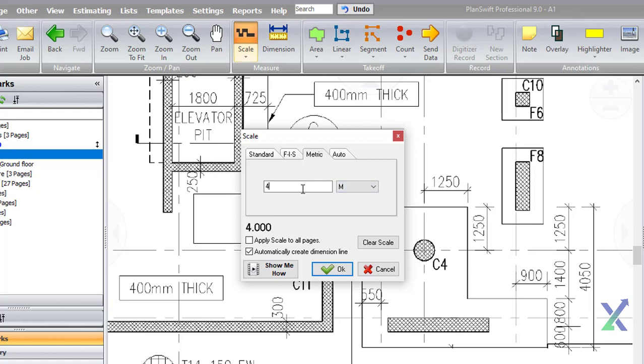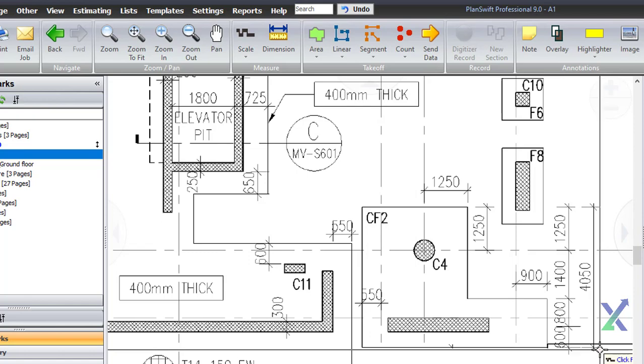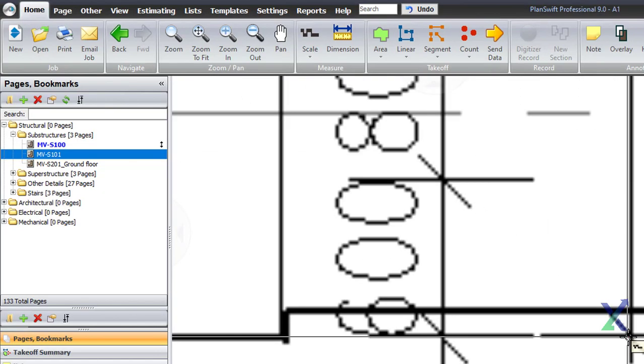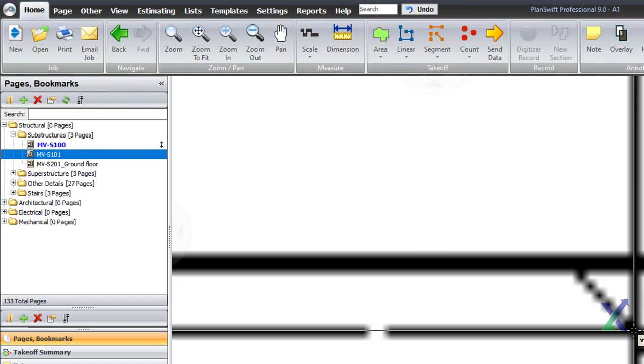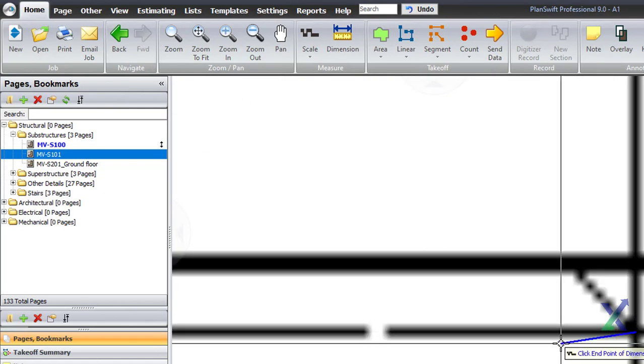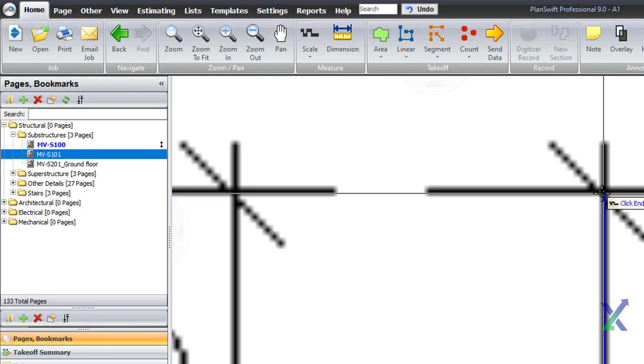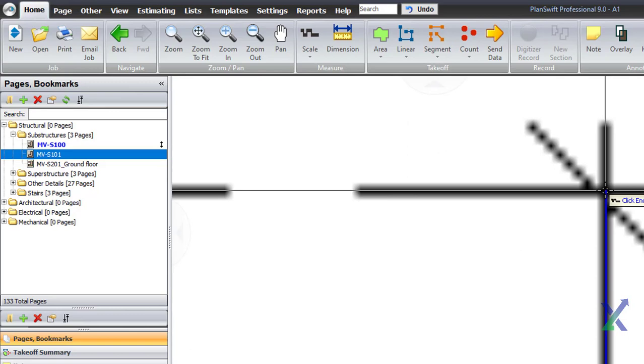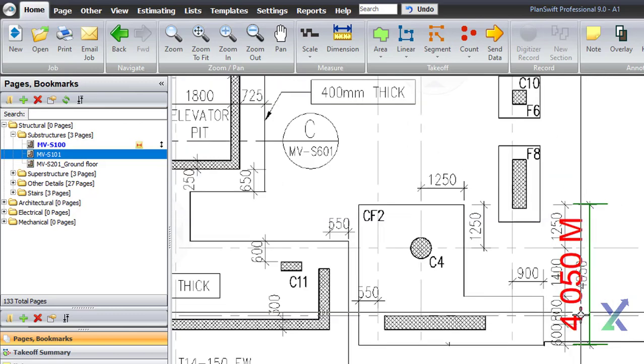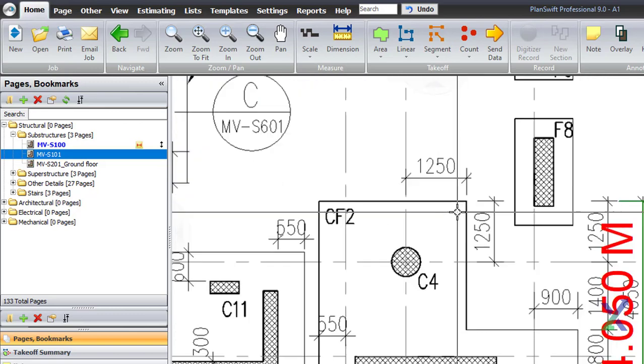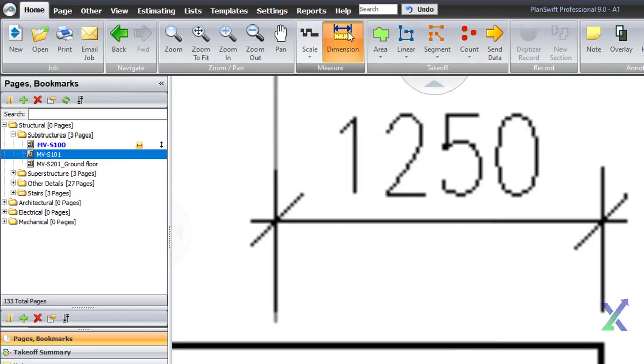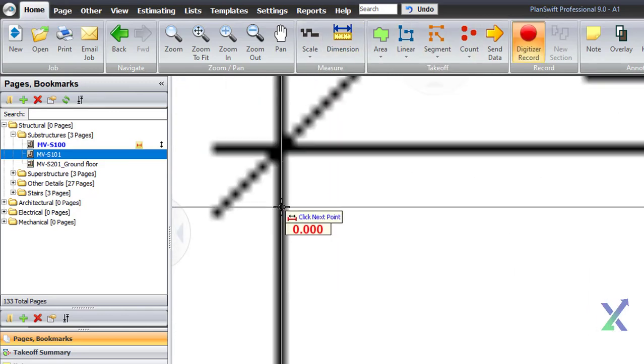Select any known measurement on the drawing, for example 4.05 meters, and choose the end-to-end points of that measurement. This will automatically scale our drawing, ensuring that our estimates have accurate values.